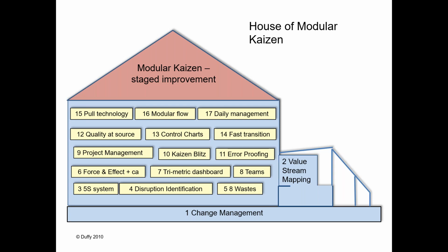If you get team members who are low risk takers, then you want to use that low risk to assign them to activities that may be very, very critical, but they might be repetitive. They might be ones that do have a low risk factor to them, so that if you were to do an FMEA on your activities, they would be the ones that have a lower impact if something goes wrong.